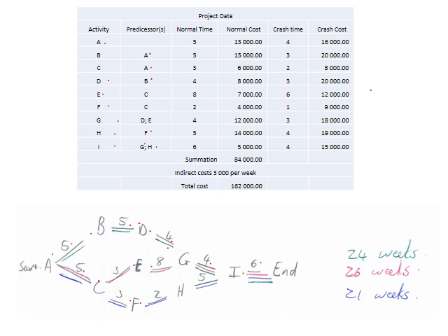Basically all that we do is we take the three possible routes that we've got. So we've got I, G, D, B, and A, and we add those together. In this instance it's the green one that we've calculated, so it's green all the way here. Remember to add that 6 here, so we get to 24. Then the red line is there.